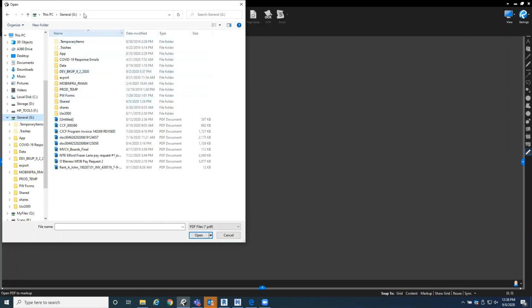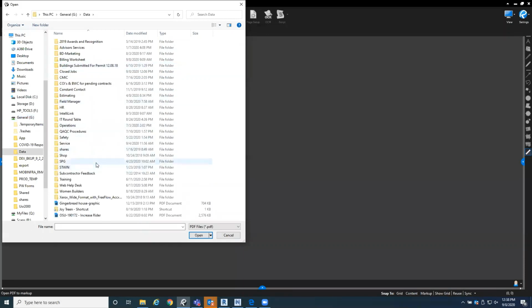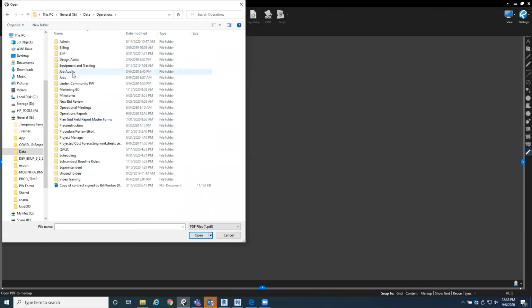So our general trades contracting, metal stud framer, drywall guy can see where the big ductwork is and how he has to frame around the ductwork, for instance. So I'm talking and looking rather than doing one or the other.